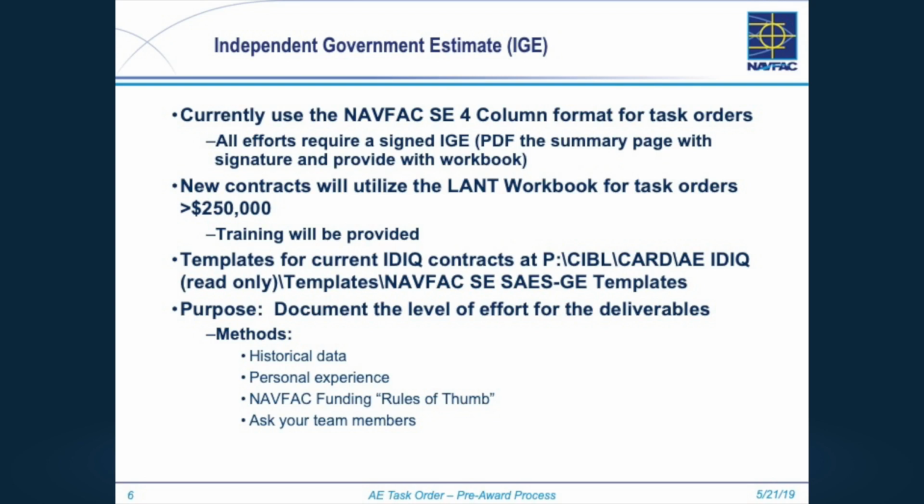Ask somebody else. There's also a NAVFAC rules of thumb that we're using for in-house estimates that you may have seen. I know Oscar has a copy of it posted to his wall. It's got, based on the design strategy and the submittal stage, what percentage of the estimated cost of construction you should be looking at and how many hours you should be allocating.